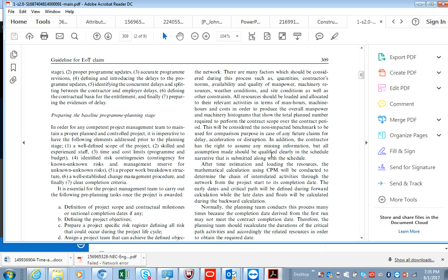Yeah, you're back. Okay, so all we're trying to say is that the sort of information that you would include within the documentation you aim to send off for an application for an extension of time: you look at the critical path, you highlight the activity paths, you highlight if there's any concurrency, and you also check the contract documentation to see if there are any contractual clauses that assign accountability for any delays to the employer, either via his